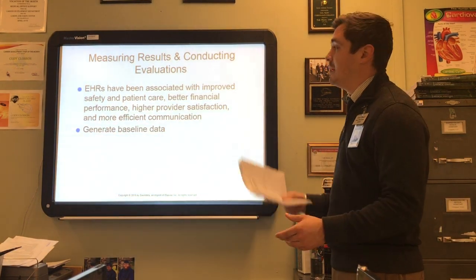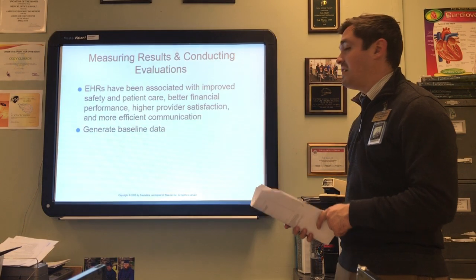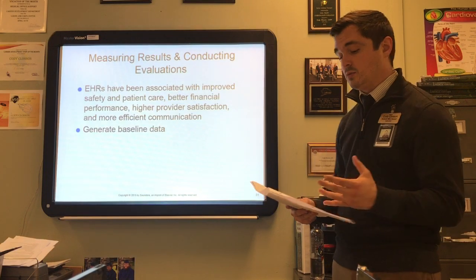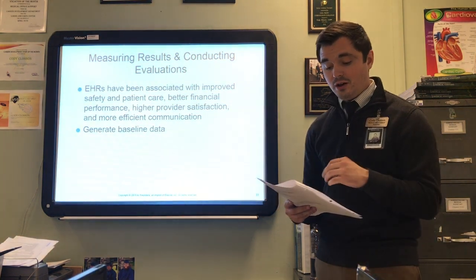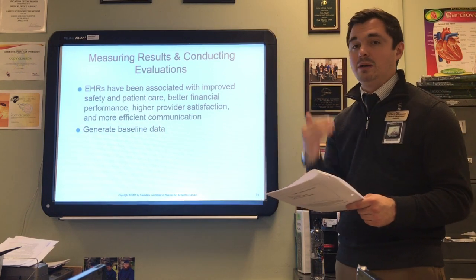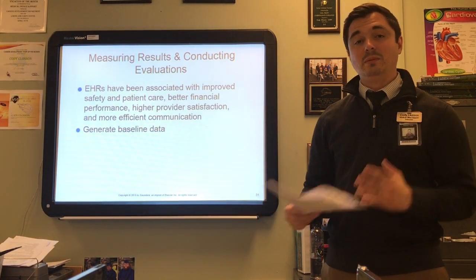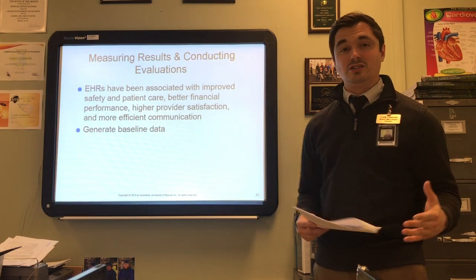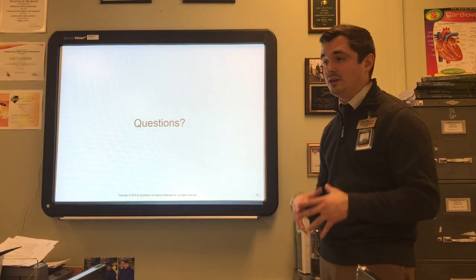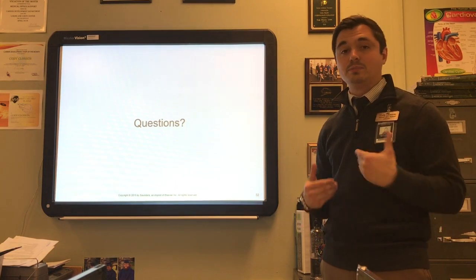After implementation, you need to measure results and conduct evaluations on how successful the transition has been. EHRs have been associated with improved patient care safety, better financial performance, higher provider satisfaction, and more efficient communication. The attributes that can be measured with an EHR are nearly unlimited — you can look at costs, how many patients you're seeing, and patient satisfaction. It's good to generate baseline data before implementing the system so you can see how much the EHR has affected your practice afterwards.